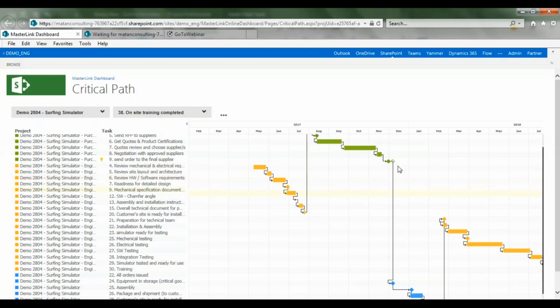Nice feature that we have here is, you can see it here in this line. This is not a mistake showing two milestones on the same task. What we see here is again the yellow light bulb telling me that a pending change exists here, and it shows me both cases, what we have right now and what we will have if we choose to accept the change. So this is also kind of a look ahead of where I might have changes on the critical path of the task that I've chosen.